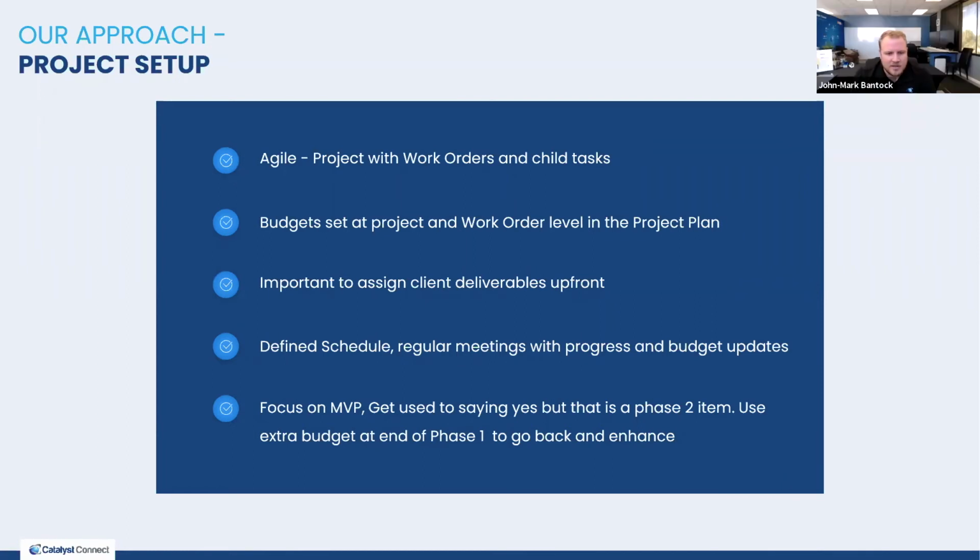Sorry, Peter, what I wanted to, something that really spoke to me was their involvement in the project. And we found that you have to have a point person, that de facto system administrator who's going to know and understand what's being implemented and why it's being implemented and how each feature or function or app supports a specific requirement that was part of that original project plan. And we found that in having someone that's clued into not only the how it works, but the why it works, really